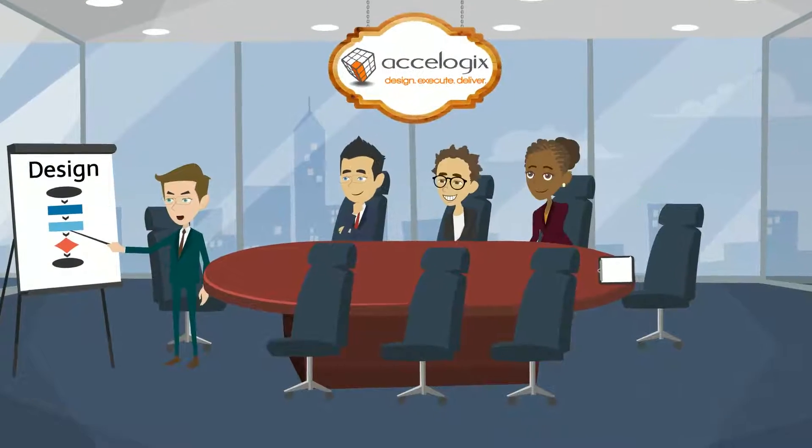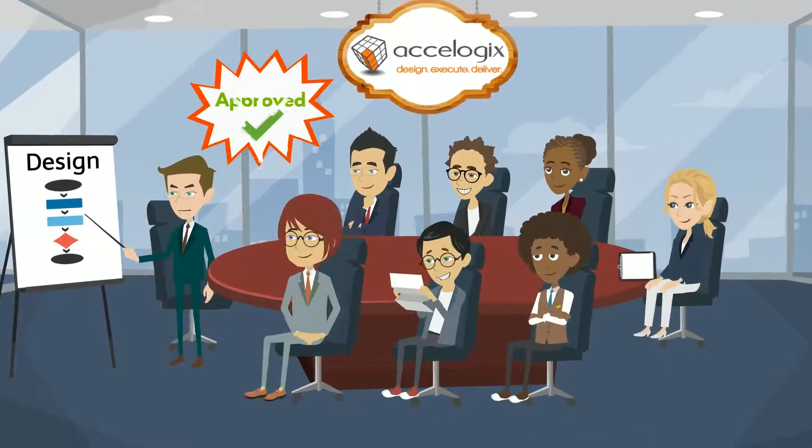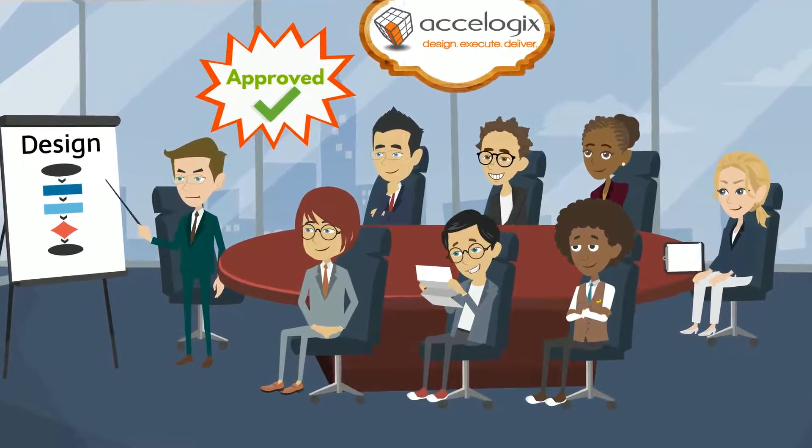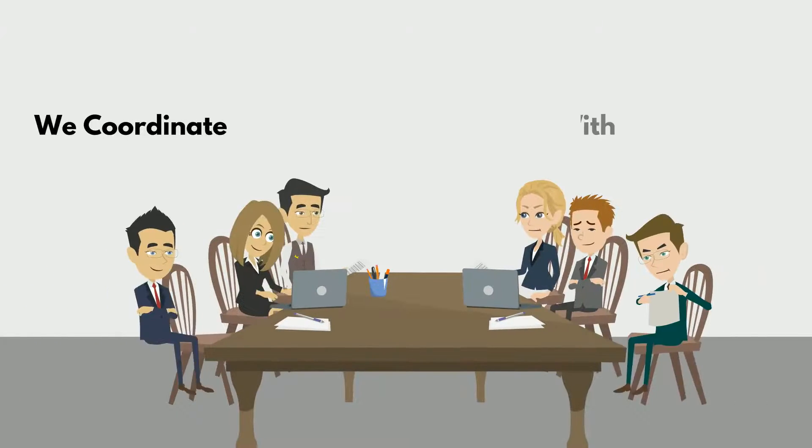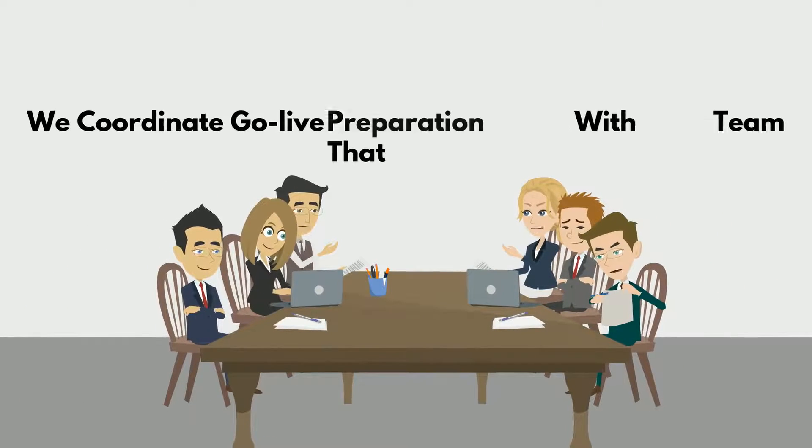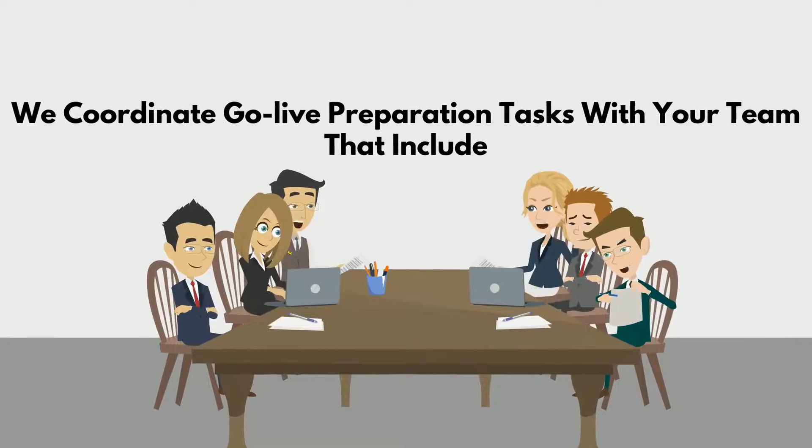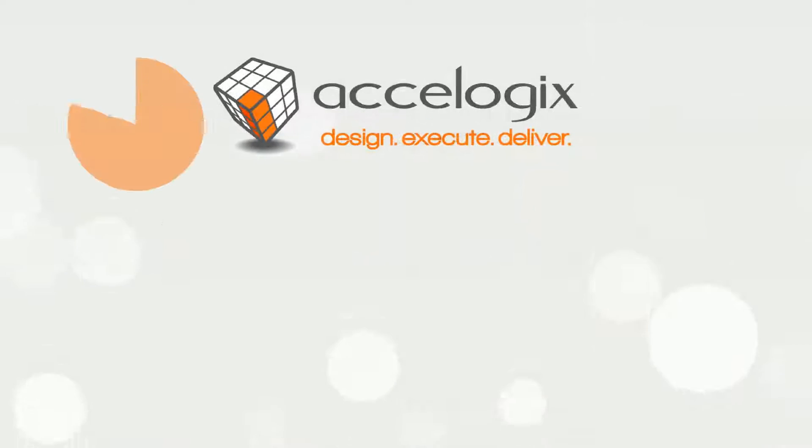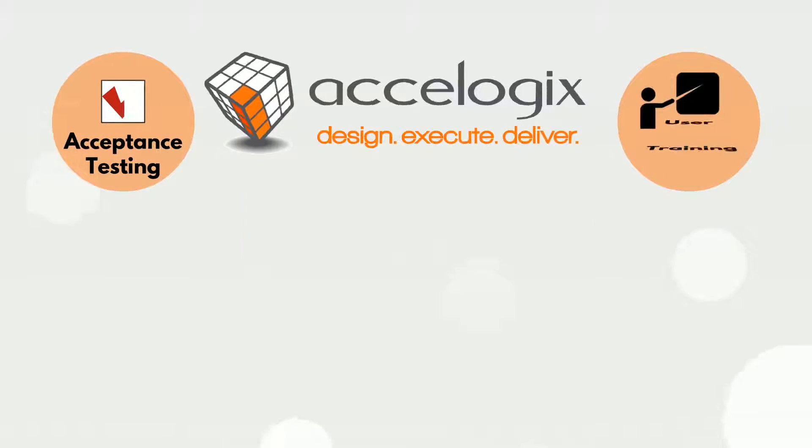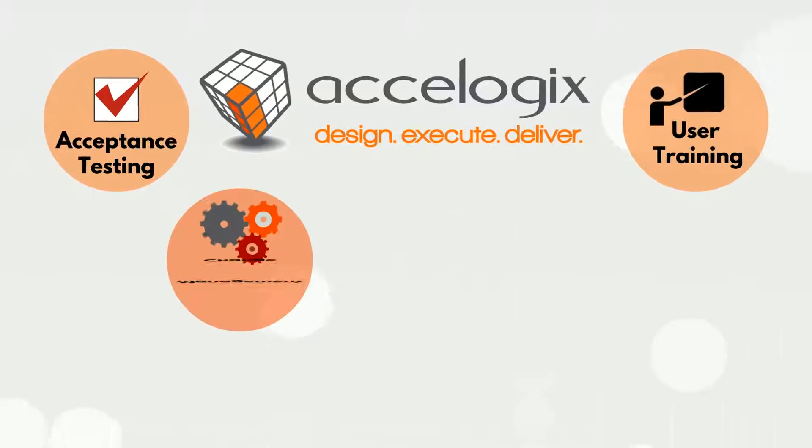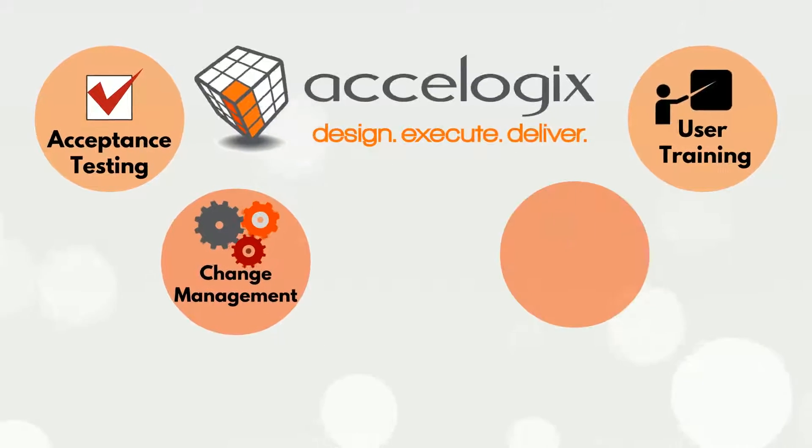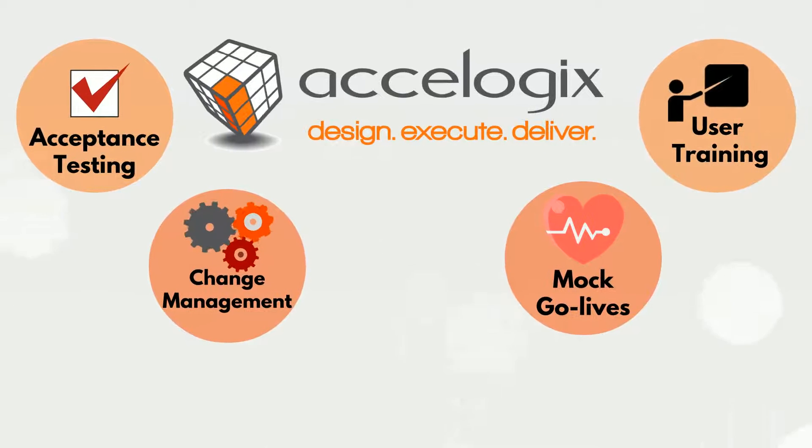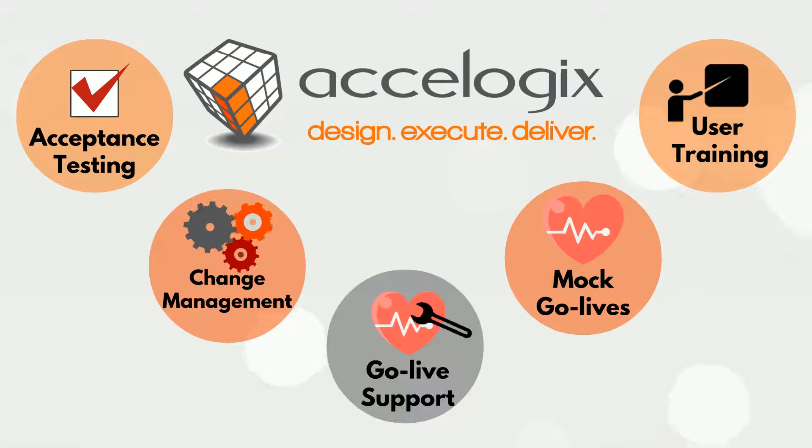After your team approves the design, we build the solution in the execute phase. When development is complete, we coordinate go-live preparation tasks with your team that include acceptance testing, user training, change management, mock go-lives, and finally, go-live support.